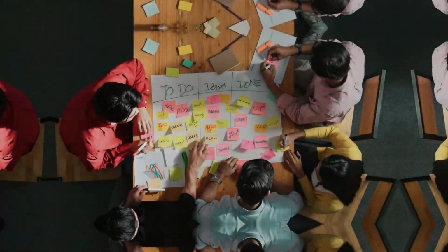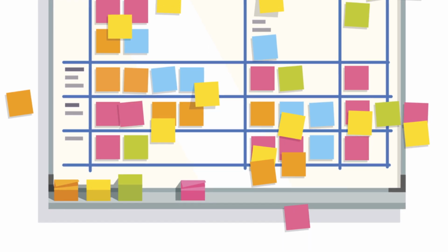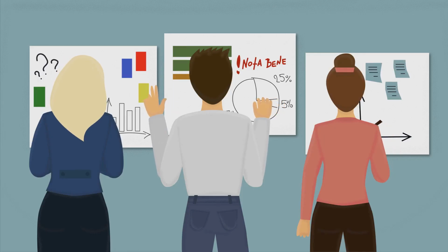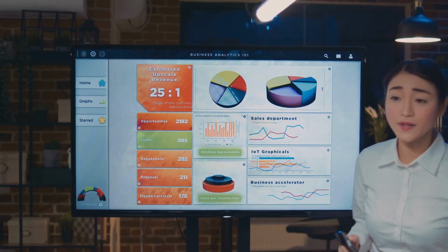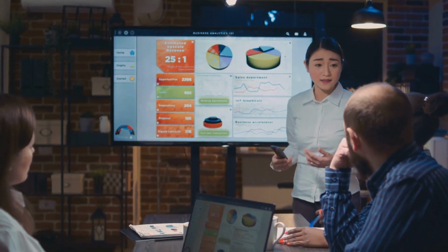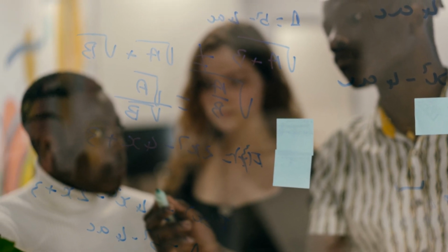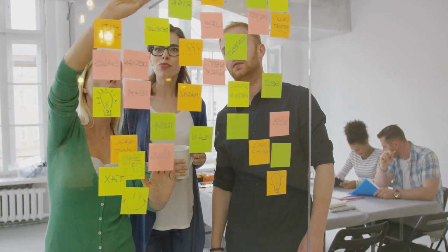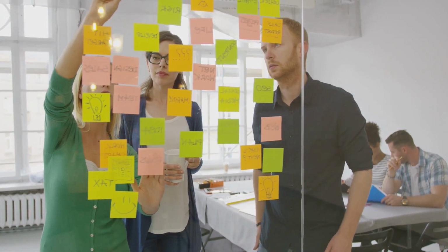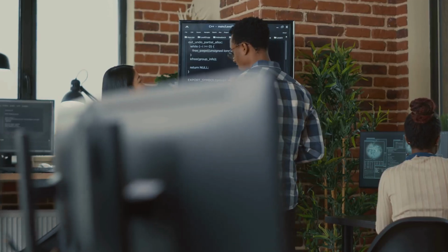To prevent frequent spillovers, teams can adopt several strategies. One of the most effective ways is to improve estimation. Estimating the effort required for each user story can be challenging, but teams can rely on historical data, story points, or relative sizing to improve accuracy over time. Another solution is to split large stories into smaller, more manageable tasks. Large user stories, also known as epics, are harder to complete within the sprint, so breaking them down into smaller pieces helps ensure progress is made even if the entire story cannot be finished.